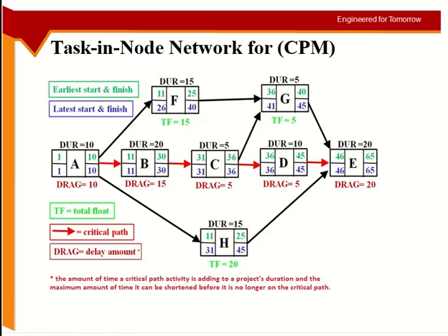Now if I go back from this, I can put the late finish. From here I have to put 45, right? Because 46, then the day previous to that is 45. If I go on this side, again I can put 45, no issues. If I go here, I put 45, no issues.